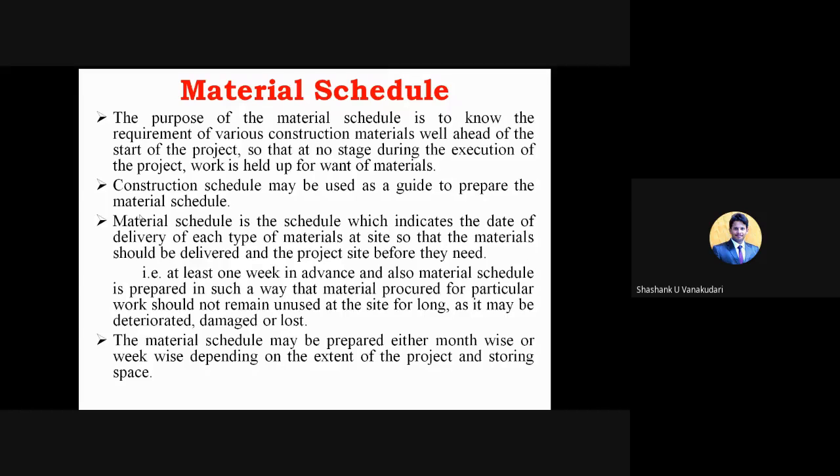So like that, you can differentiate those resources into a number of parts, and then you pick the material part, and you should note down all the materials you require: cement, sand, coarse aggregate, and water, right? And then you also require reinforcement, formwork, so many materials, right? So you note down the required quantity and required type of materials for every activity, and you are going to assign that before starting those works.